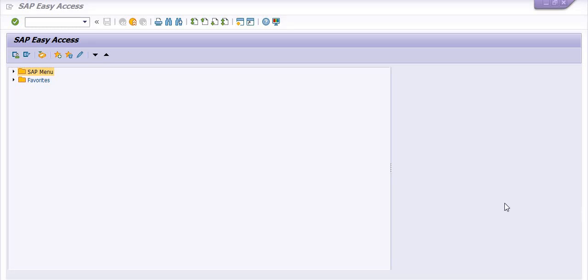Hello, in this video session we are going to learn a very important topic: how to display any WBS element in SAP. For display purpose in SAP PS we are using transaction code CJ03. CJ01 is for creation of the WBS, CJ02 is for changes to any WBS, and CJ03 is for display purpose.